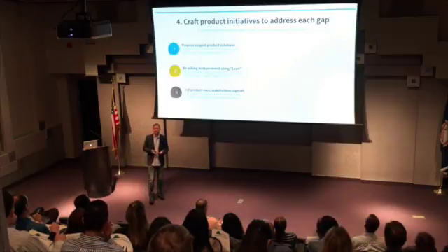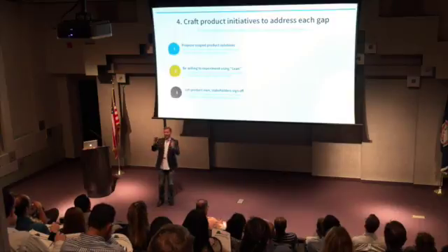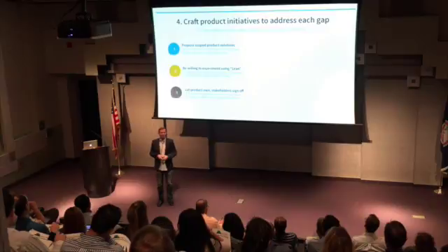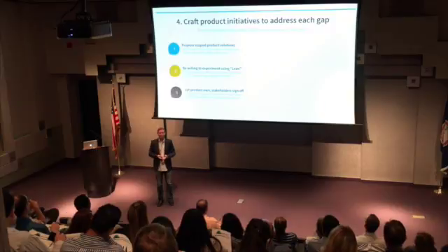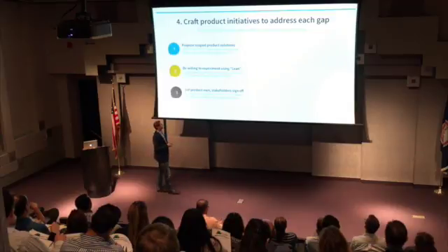What I don't think is really healthy is to say, aha, we're currently a C over here, we need to be an A. Here's this 2-year-long project that's going to go solve this problem. The reality is you're going to have a lot of assumptions behind how you do that. So be out there testing those assumptions to figure out how you can best close the gap between the two grades that are there.